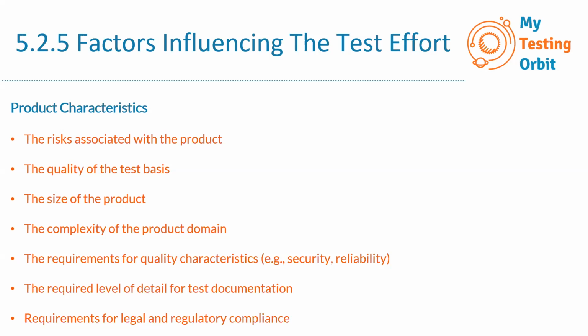For example, planning, when we do the test planning, when we design and write the test cases, and when we generate test reports. Of course, all these activities are part of testing, and they do consume time. So whenever we are estimating the test effort, it's really important that we also consider all these things.